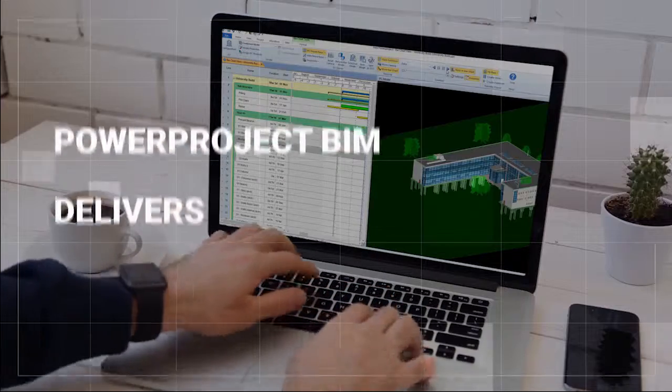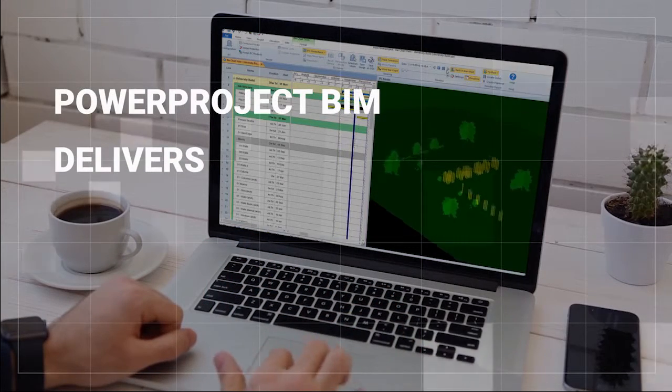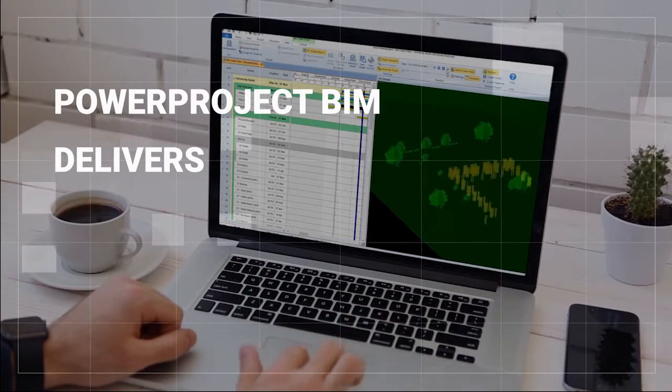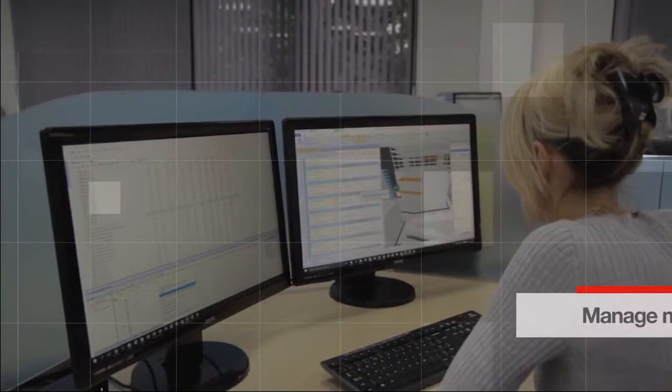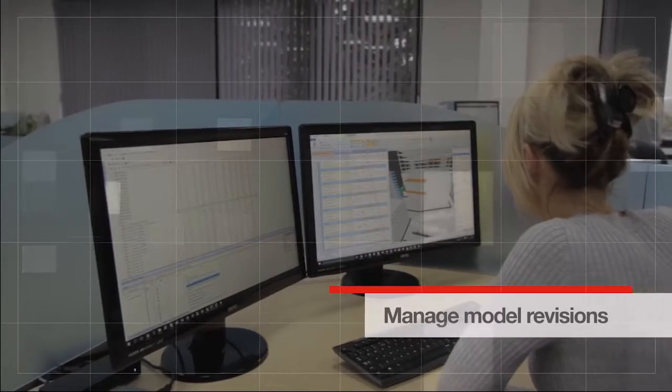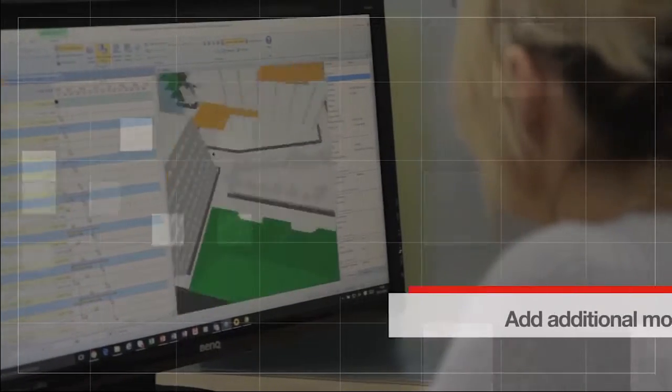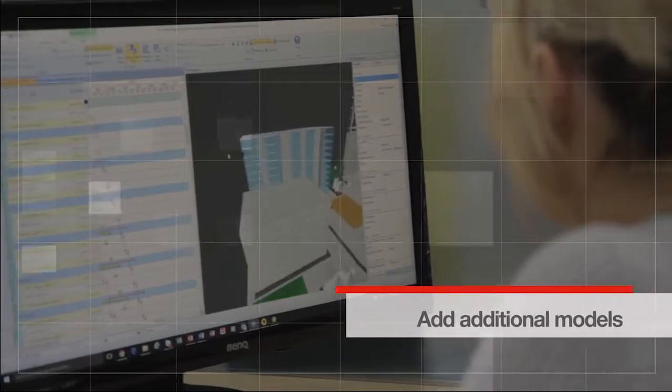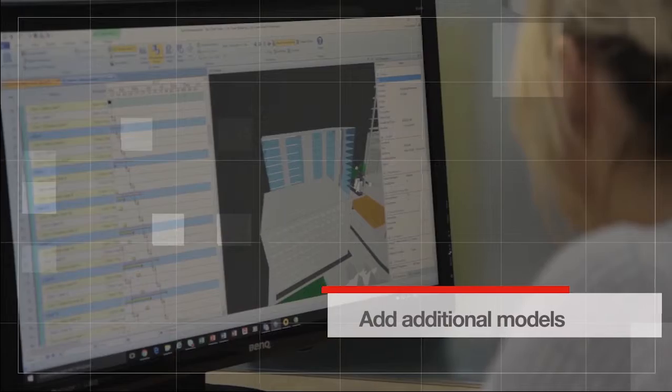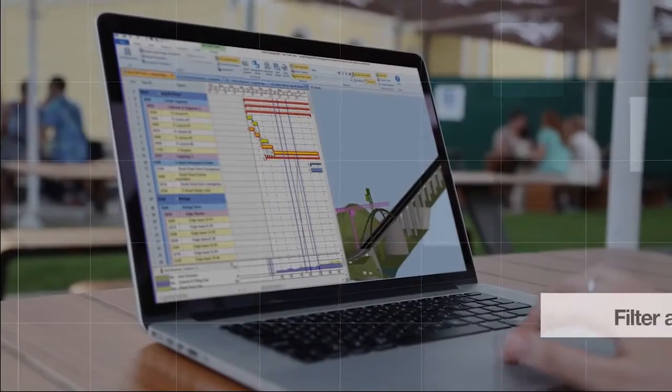Some of the powerful options that PowerProject BIM delivers include managing model revisions as the design evolves, adding additional models to reflect site objects such as tower cranes, porter cabins and hoarding.